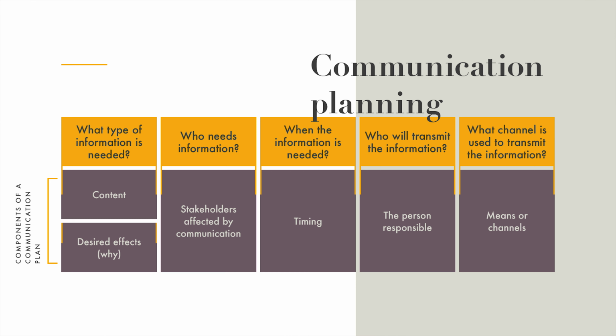What type of information is needed? Who needs the information? When is the information needed? Who will transmit the information? And what channel is used to transmit the information? If you're able to answer these questions, you have actually covered all the elements of a communication plan.